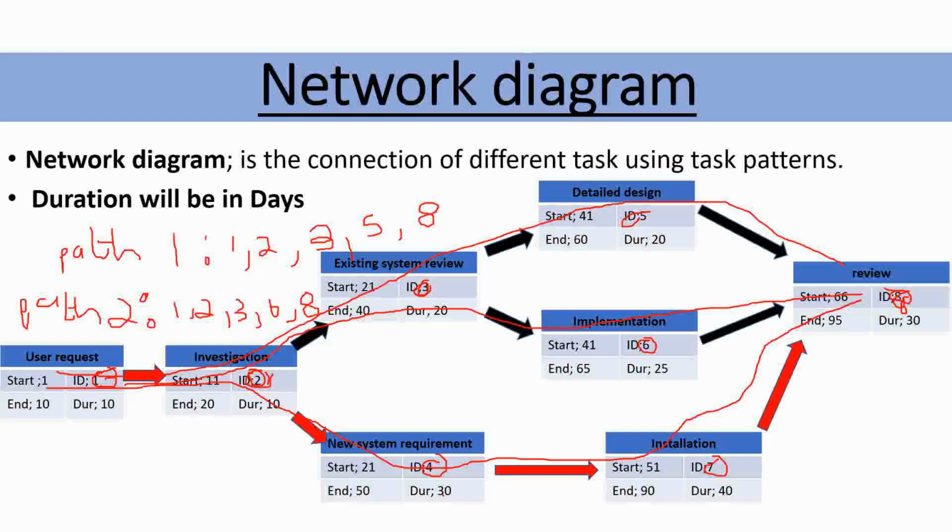This one takes longer to end, which will end in 30 days, right? This one ends sooner than this one, in 20 days, which means this one ends in less than 10 days, right? This one. Therefore, this one has a slack time. This one has a slack time of what? Of 10 days.